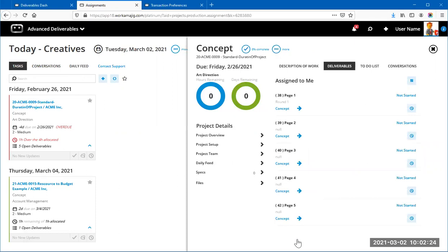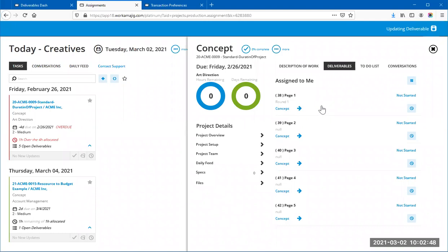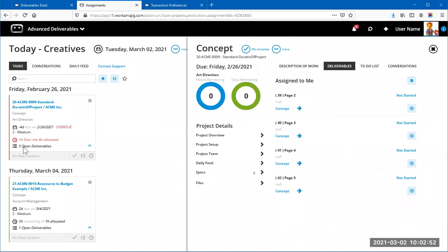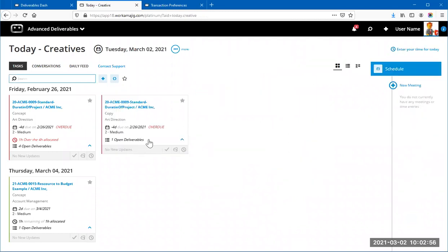That's what your creatives can do — open each deliverable and send the round out. We can see one is in Round 1 and the others haven't been sent yet. Once a creative has done their part and uploaded the concept art, they can click the arrow to move that deliverable to the next task in the schedule. After refreshing, whoever is assigned to that next task will see the deliverable and can take over the workflow.